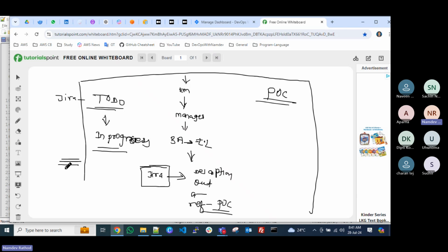to add everything in the comment box. Don't just move the ticket to In Progress, do all the steps, and finally make it Done. Whatever you have done, like reading some documentation or performing some deployments in between, you need to mention all the details in the Jira ticket comments.